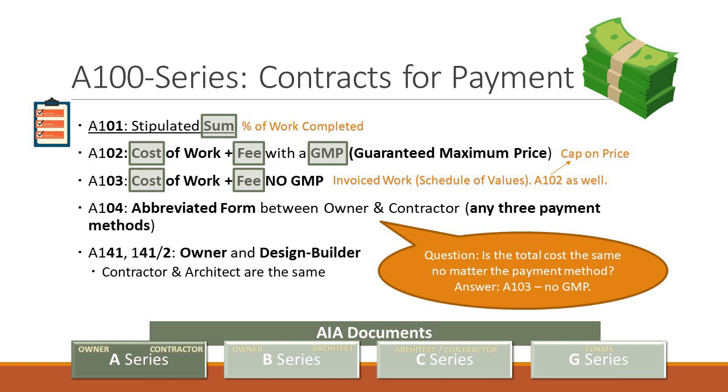One of the things you're going to need to learn as an architect over the course of your career, working with senior people at your firm, is how to walk a project site and analyze the percent complete of the work and use your trained-eye guesstimate against what the contractor is invoicing. And there will be a discussion once that payment application is submitted between yourself, the owner, and the contractor to make sure the numbers are relatively fair and accurate as to the amount of work performed.